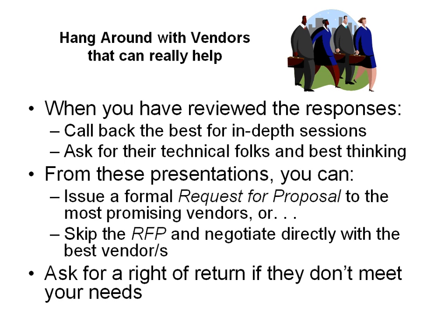One of the things you want to do, and this is always a little difficult with vendors, is ask for a right of return if they don't meet your needs. Most software contracts have a clause down about page 37 that says, we warranty that this software will work as we have said. In other words, if they come in and show it working in a certain way, the lights are flashing in a certain way, and it does certain things, that it'll do that. And you can return it, and they'll have to pay you back if it doesn't do that. But there's also a clause that says, we don't warranty this for application to any specific requirement, which means it'll work, but if it doesn't work for what you need, that's your problem, not ours.